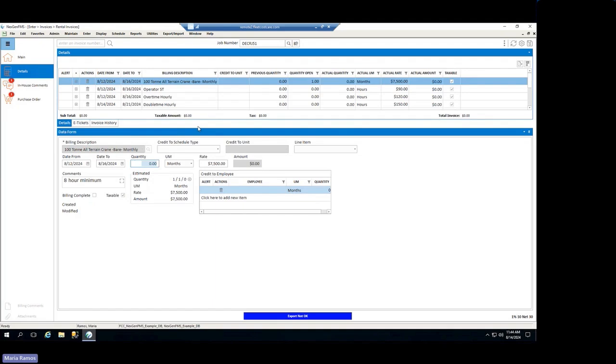So as I mentioned, these billing codes are coming in based on how you have the estimated billing set up on your job. So that is something that you want to make sure that whoever is responsible for keeping that updated, whether it's your salesperson or perhaps it's your dispatcher, whoever is responsible for making sure that the estimated billing is looking correctly based on how the job is and how it should be billed, because it may change from how you've created it from a quote. Then it'll flow through much more efficiently on your invoices and less that you have to update at the invoicing level.